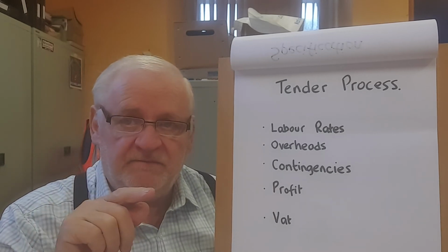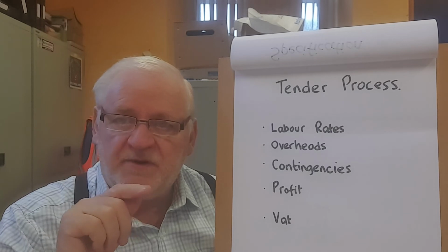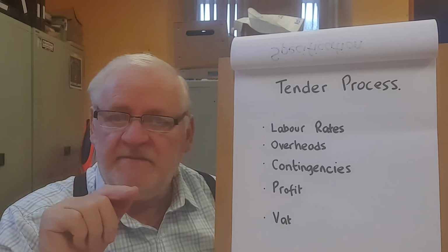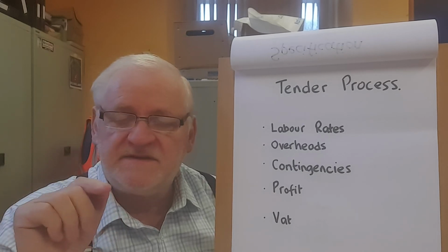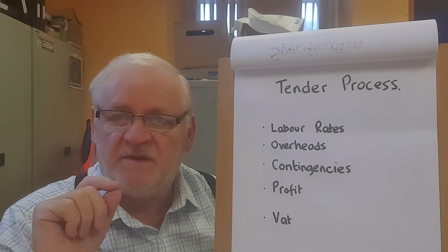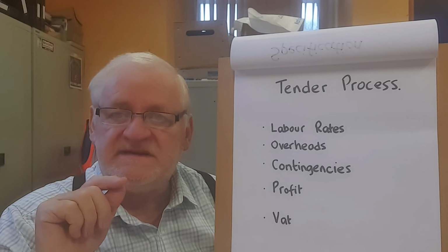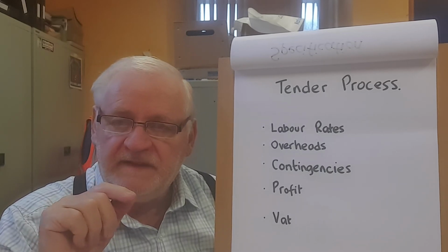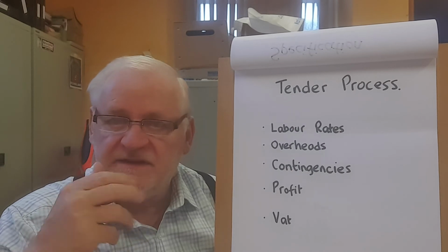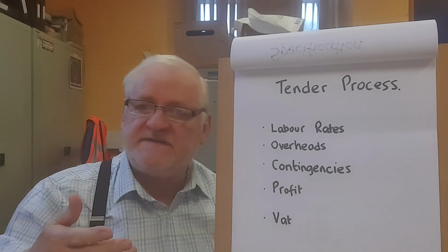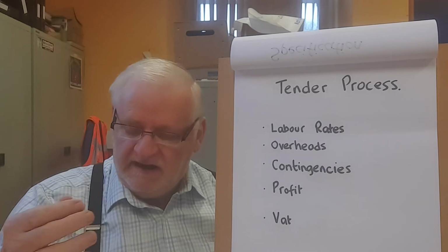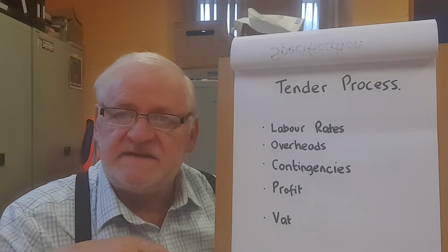But then at the bottom, it will say that this price is for a certain limited time, and I'll specify maybe 3 months or 3 weeks or whatever specification I want to give. And it will always say that this is subject to a variation order. Now, a variation order is just another document, and normally when I'm giving the price, I give them a blank variation order at the same time. And generally people don't know what that means, and they'll say, what's this?